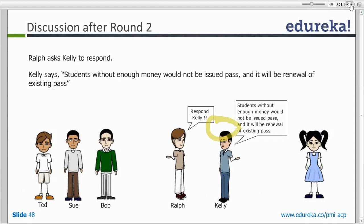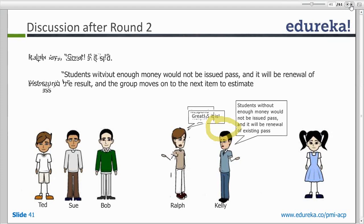Sue says 5 is just right for her. Ralph asks Kelly if there is anything more to add. Kelly says students without enough money will not be issued a pass, it will only be a renewal of existing passes — no credit facility and no new passes will be issued. With no more questions, they go to a third round of voting, and everyone agrees on 5, so the story size is 5.